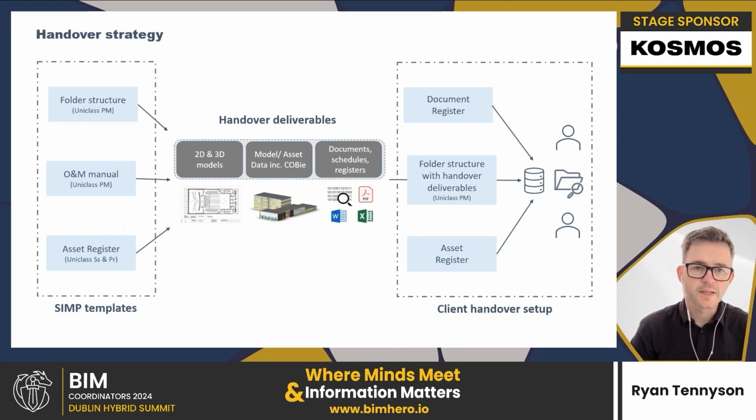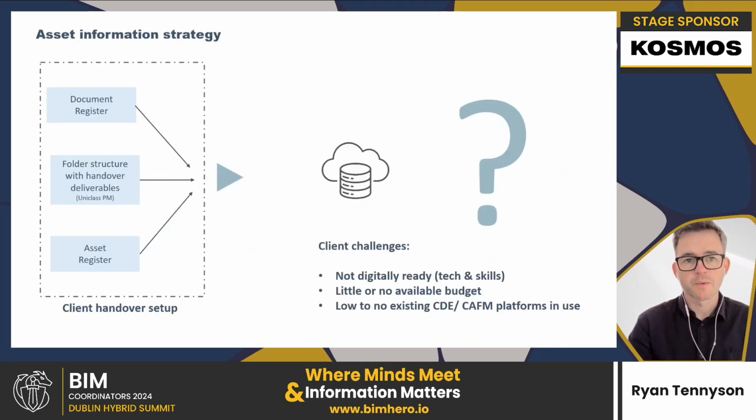This has helped to address challenges around not just how information or assets are named on projects, but also how information is transferred from one party, i.e. the contractor, across to the client. Having this folder structure has helped mitigate the risks, or the difficulties, of doing that directly from one platform to another, where in a lot of instances metadata and document information gets lost in that translation. And as I said, most of my work over the past 3 or 4 years has been supporting that schools programme and those projects to deliver that information and handover.